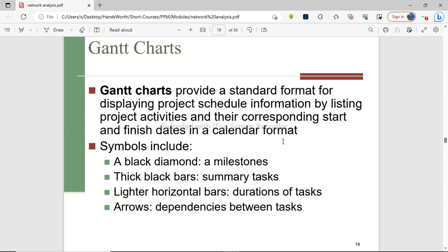However, it is unable to reflect certain information, such as the resources that are required to implement a given activity. So that can be one of the weaknesses. As you can see, they haven't yet shown what the weakness of a Gantt chart is, but if you have been following classes since we began, you can tell that if you use a Gantt chart as a way of creating a schedule, then you'll have some challenges with regards to monitoring the resources required for each given project.